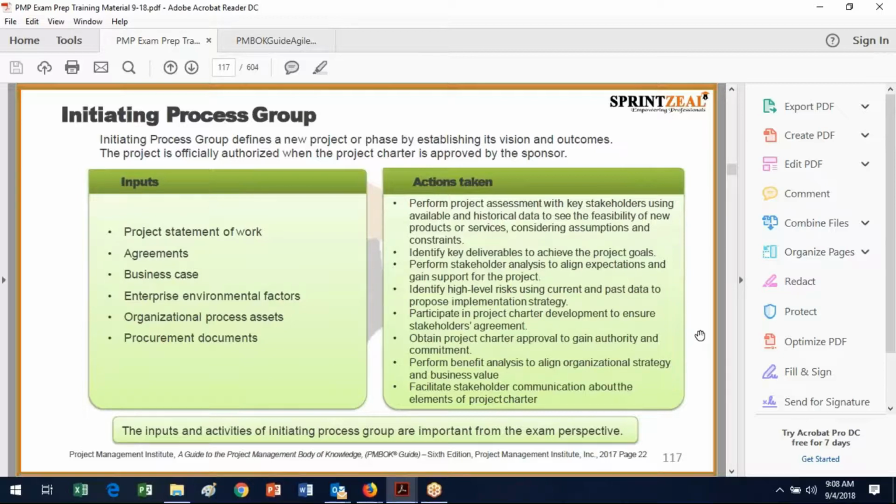But you're right. If something fundamentally changes, then you need to have an addendum. Yep. And because of that signature process, obviously you need the key people to sign it. And if personnel change, you may need to have the new personnel who come in. It guides the project unless there's some type of written change. That is how the project is handled. Right. And again, it necessarily needs to stay at a relatively high level.